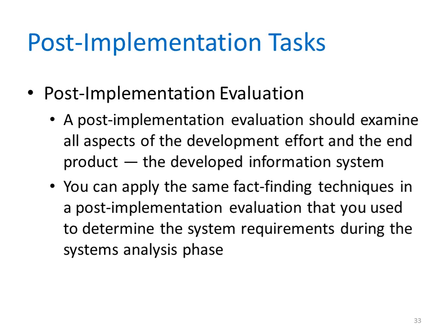A post-implementation evaluation should examine all aspects of the development effort and the end product, the developed information system. A typical evaluation includes feedback in many areas, and a checklist is included for you on page 547 in your text. You can apply the same fact-finding techniques in a post-implementation evaluation that you use to determine the system requirements during the systems analysis phase.